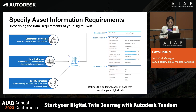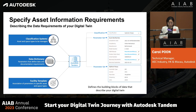In Tandem, it all starts by specifying the asset information requirements of the digital twin. The first step is to define your asset breakdown structure, which can either be based on a standard classification system such as MasterFormat, UniFormat, or OmniClass, or you can build your own hierarchy classification system based on the owner's needs, possibly specified by existing CMMS systems. Second, leverage and extend our data dictionary or parameters to define what data needs to be managed within your digital twin. This includes simple values, document links, and outcomes. Standards like COBie or BuildingSMART provide an excellent foundation for your data dictionary. The final step is creating a facility template that specifies which parameters apply to which asset types — this may often be prescribed by standards like COBie.